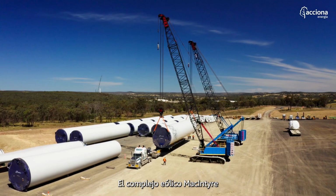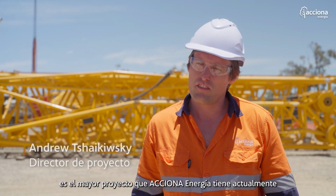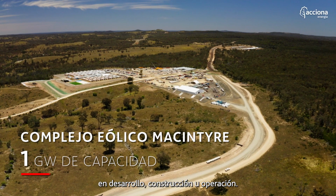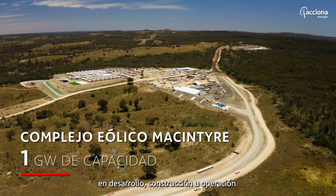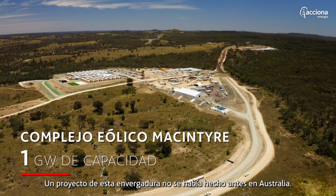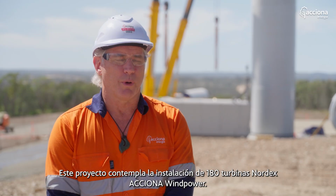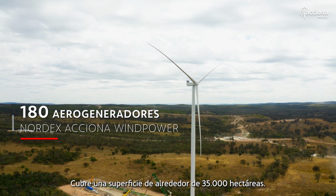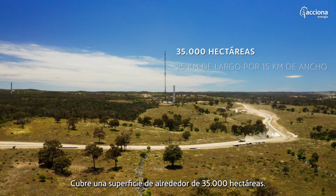The MacIntyre Wind Precinct is the largest project ACCIONA Energía has currently under development, construction or operations in our fleet. A project of this size hasn't yet been done here in Australia. This project entails the construction of 180 Nordex turbines. It covers the area of about 35,000 hectares.